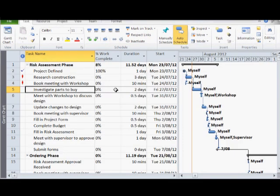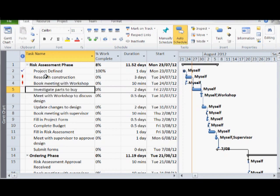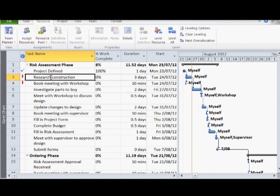Going back to the Gantt chart view, we can clearly see there is an over-allocation that occurs on tasks 3 and 4. We can use project to help us try and avoid over-allocation of resources. This is done via leveling. If you go to the resource tab, you can then find the different leveling options.